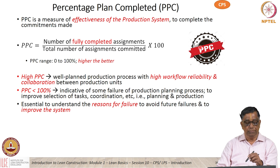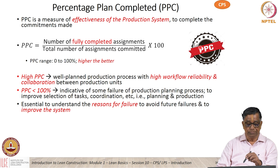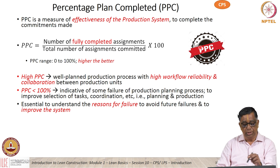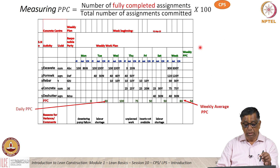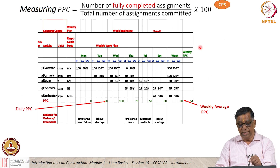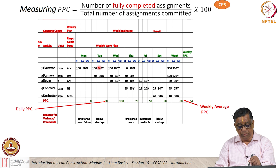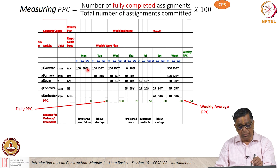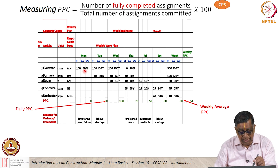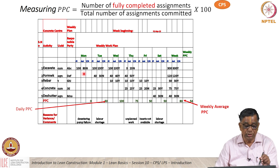I talked to you about this parameter called PPC — the Plan Percent Complete. It's a measure of the effectiveness of the production system. In mathematical terms, it's the number of fully completed assignments divided by the total number of assignments committed, multiplied by 100. For example, if you look at a weekly planning from Monday to Saturday, there are various activities. The first column for every day shows how much was planned; the second column shows how much was actually done.